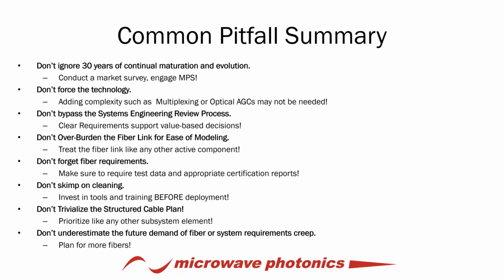You surely are not going to get the performance, and you're surely not going to meet your specification requirements, and you're not going to have anything to really hold that supplier's feet to the fire if you're not requiring test data, that you're not holding them to the Telecordia standards, and that you're not requesting the appropriate certification reports, just like you would if you were buying frequency reference or phase matched cables, or any type of coax cable. You would expect that, and surely you want to do that for the fiber cable.